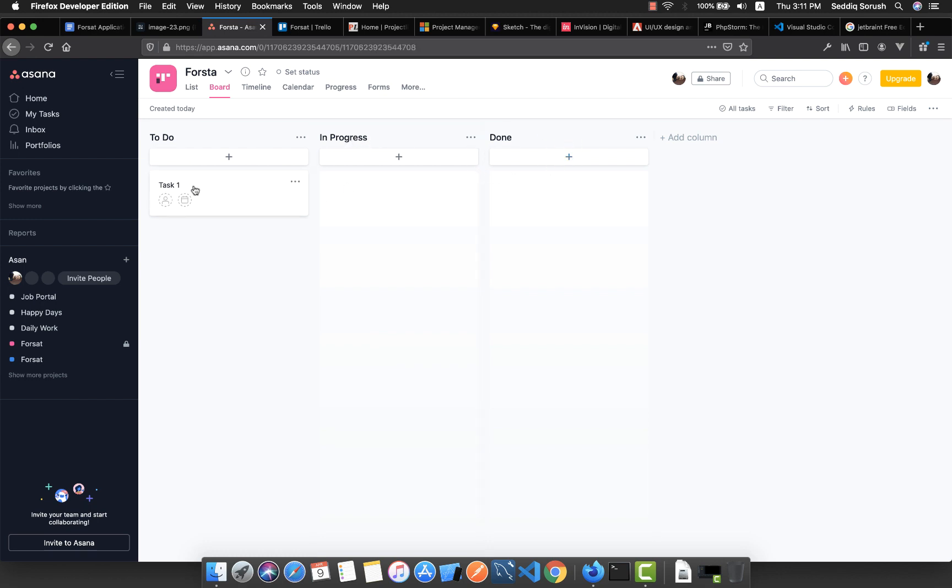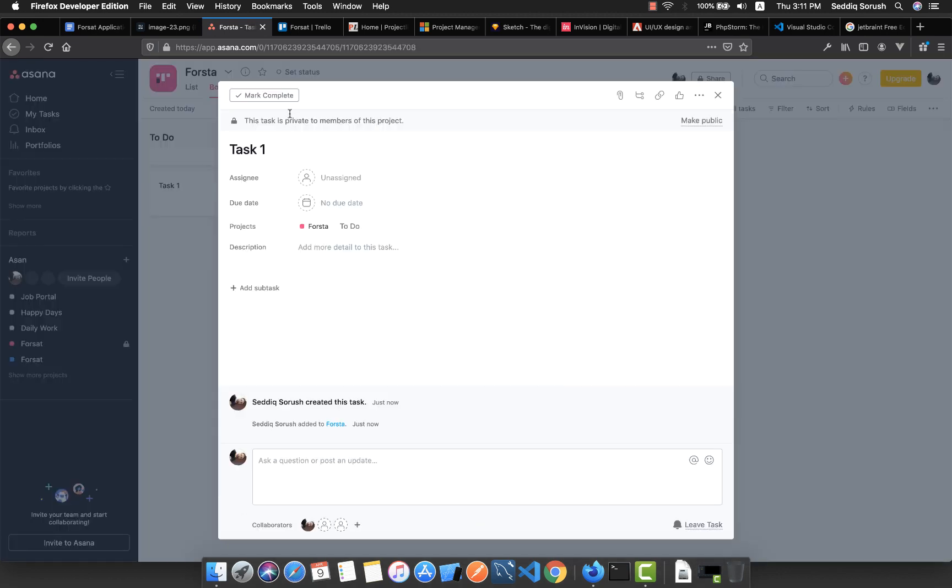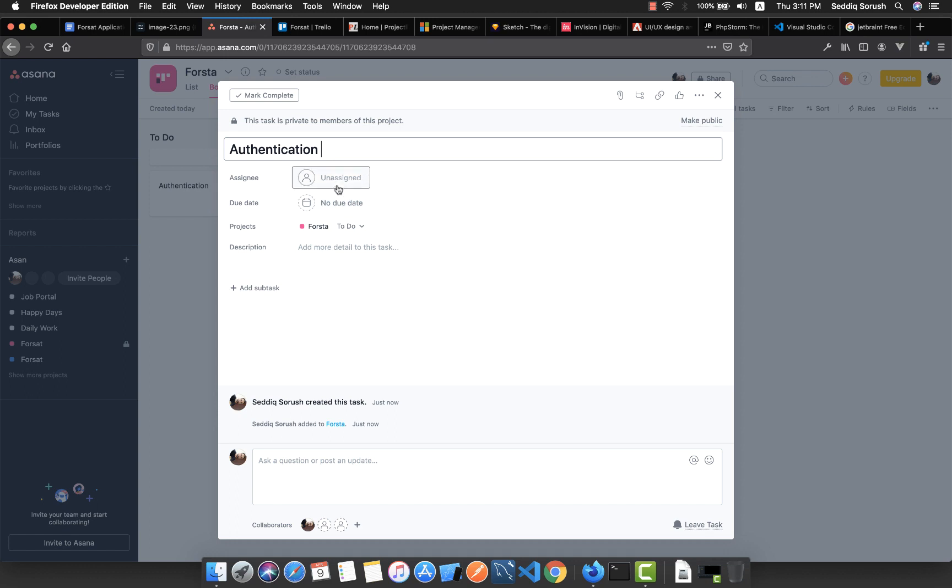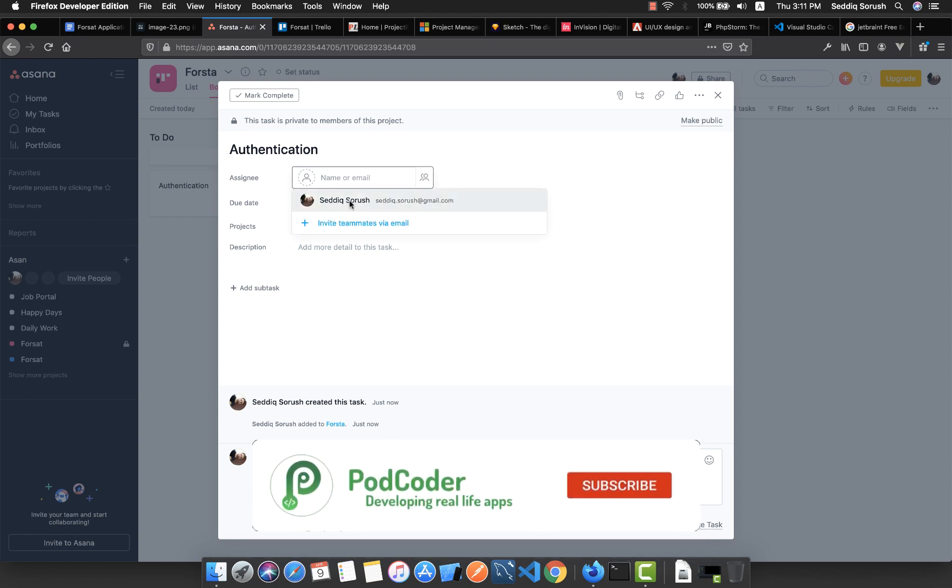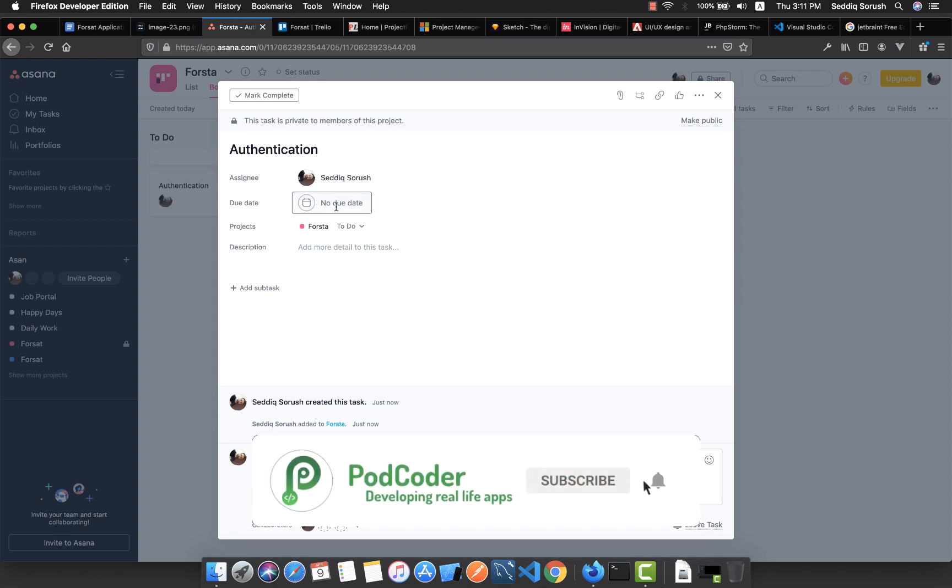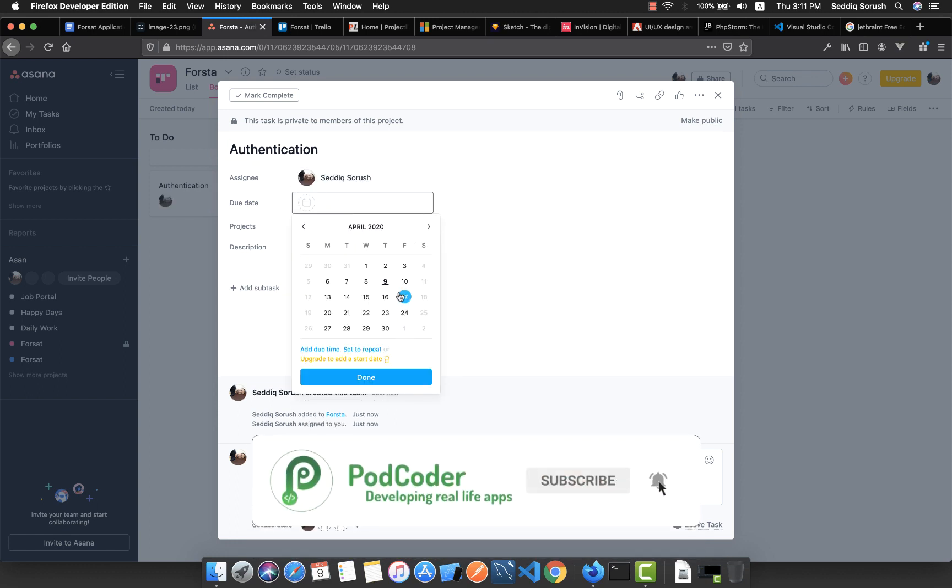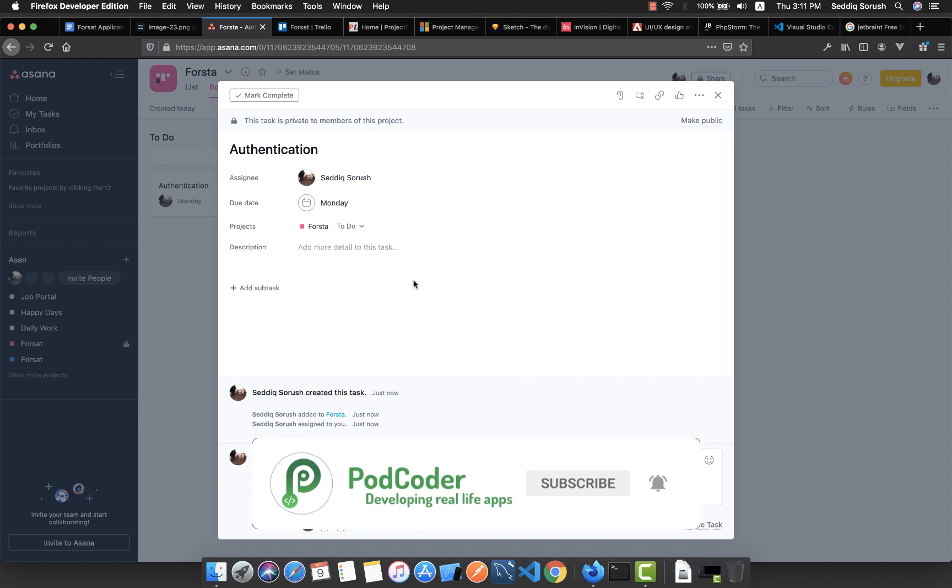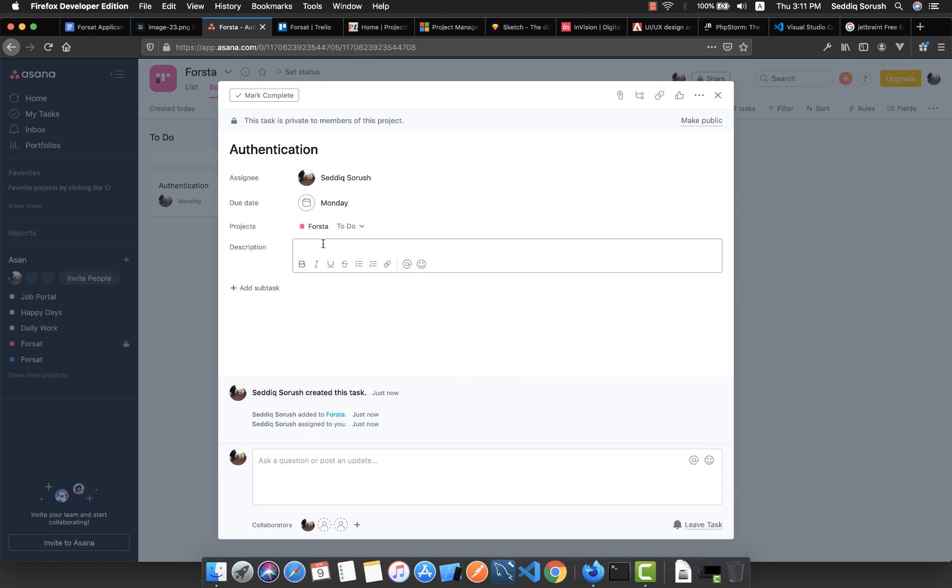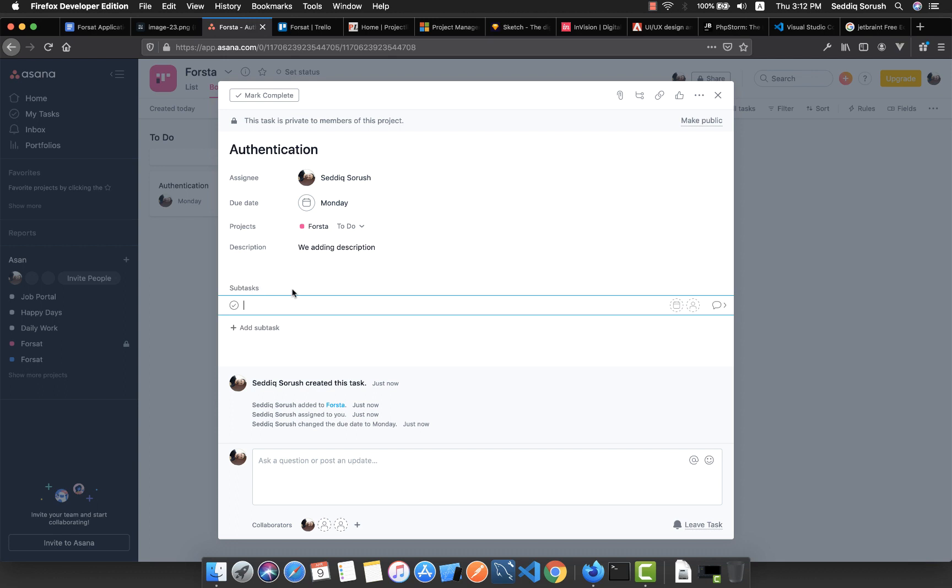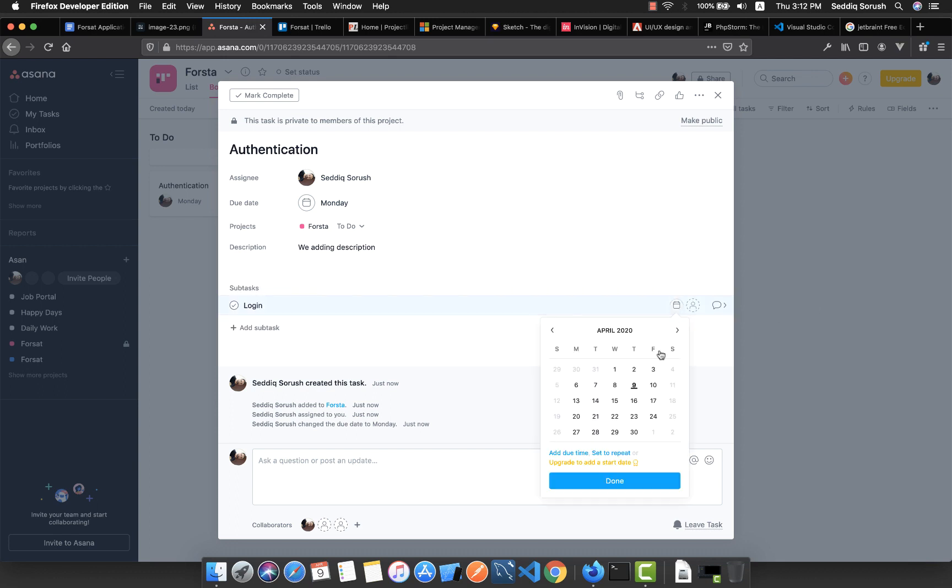Here are some to-do tasks that we want to do, also the progress which we are currently working on, and the completed tasks. Suppose I'm creating a task called authentication. We want to do authentication for our app. Also, we're able to assign it to this person and suppose we want to complete this task on the 14th. We're adding description here and we're able to add some subtasks.